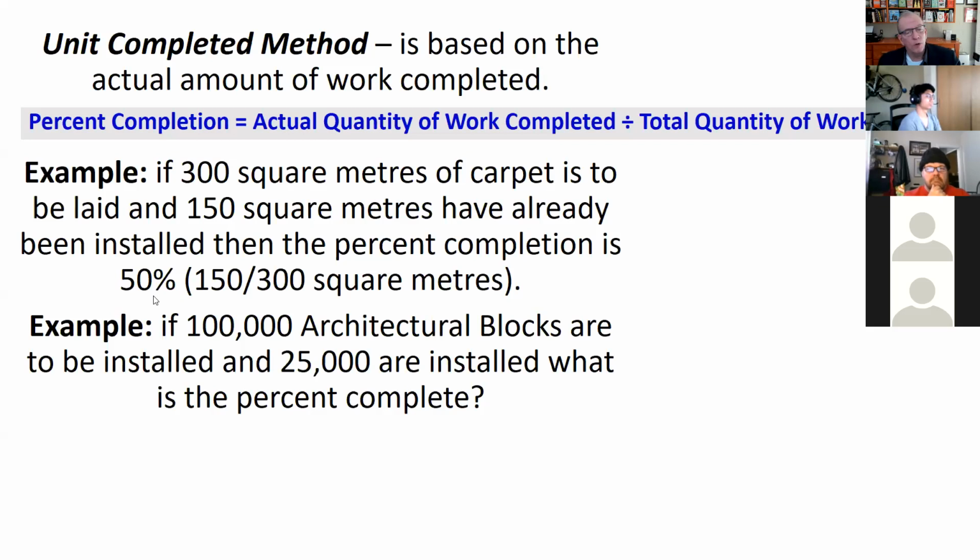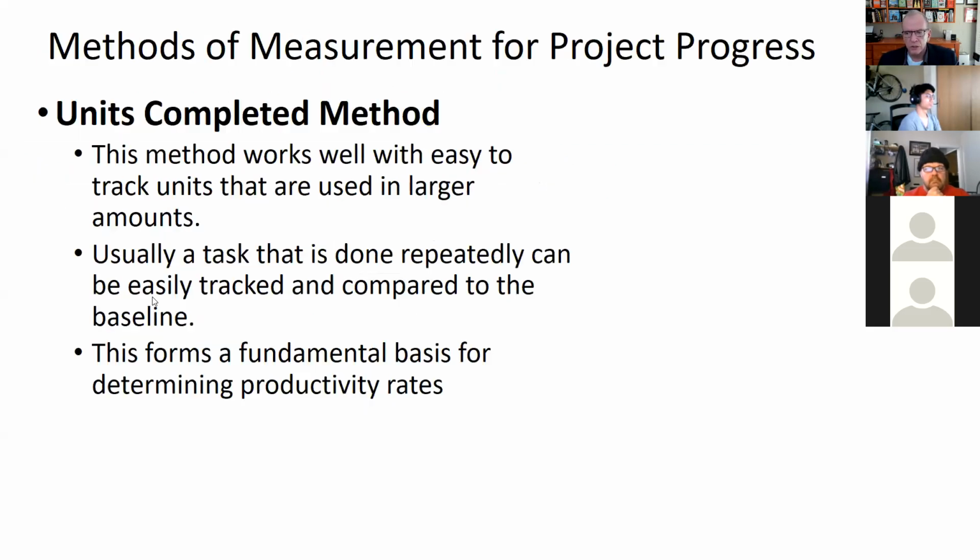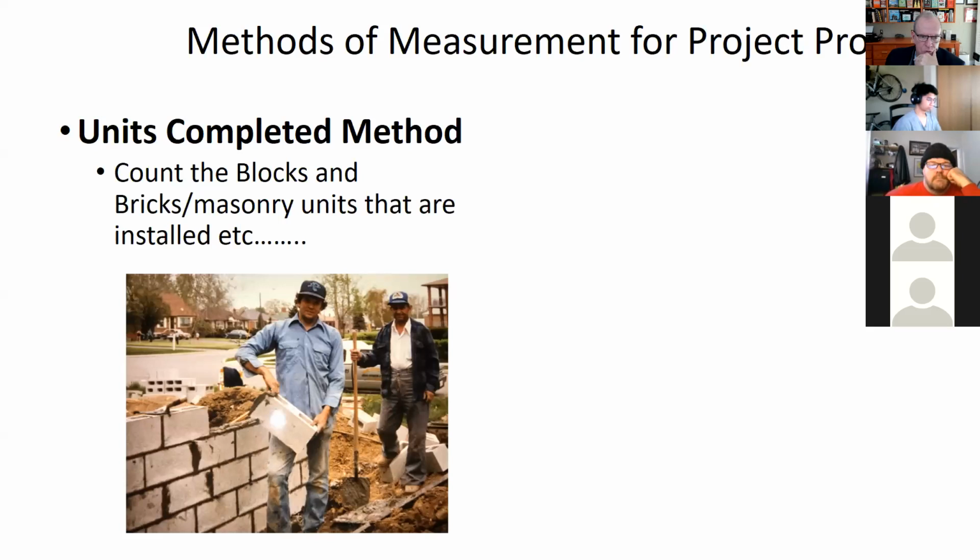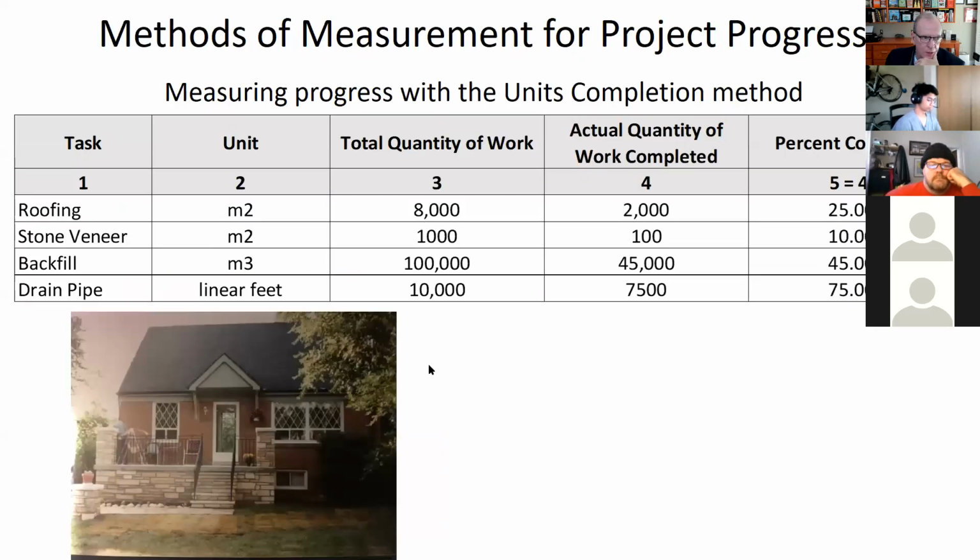But generally, in general, it gives you a really good idea. But I think in the back of your mind, you should always keep an idea. Like if you were tracking at just exactly the pace that you expected, but you've done all the big easy walls and now you've got all the little intricate stuff to do, you might have wanted to be ahead a bit in your time frame if you were now coming up to all the intricate work. So you have to keep that kind of in mind with units, because there's factoring that's involved in that aspect of it in reality when you're trying to say what's complete and what's not.